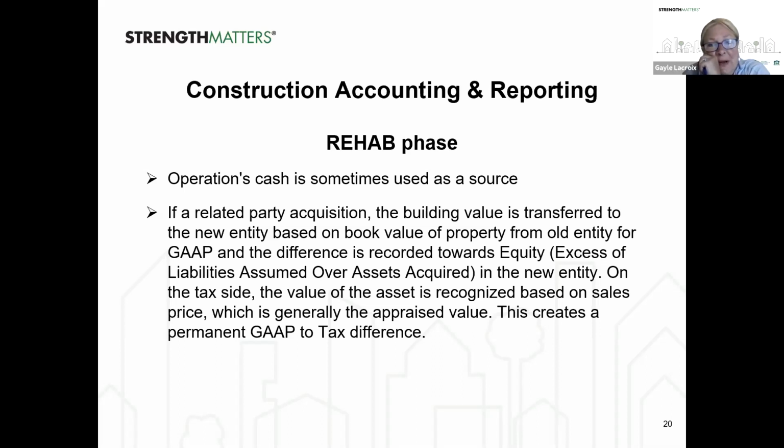Yeah, you should make sure your asset management staff is aware of that, though, because I had that happen on a deal where we started to go over budget in a line item, and the development people said, oh, we'll just use the operating cash, and didn't tell anybody on the asset management side. And we ended up having some cash issues. So again, staying in tune all the way through the project to make sure there are no surprises is just so important.